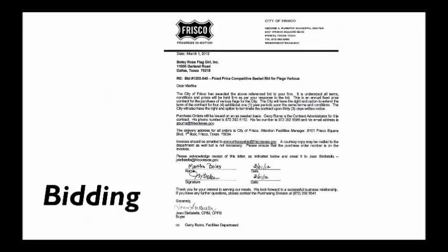And so what will happen is they'll get copies of all of the drawings and specifications, and they have a certain amount of time where they can review it and look at it, and then they come back to the owner with different proposals that say, okay, I can build this building in this amount of time for this amount of money with these different parameters, and then they sign off on it. And what that allows the owner to do is compare all of these different proposals and select from one of them.